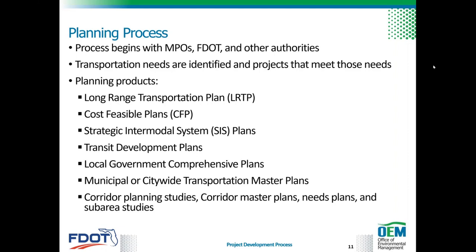Technical studies for a project can be performed within the planning phase to define or refine project parameters and establish the purpose and need for the project. They may also determine funding needs, identify alternatives, including alternative modes, and define the concept and scope for the transportation improvements, including the general location of the proposed project. The planning studies inform the development of the scope of work for the PD&E studies. Alternatives development may begin during the planning phase.